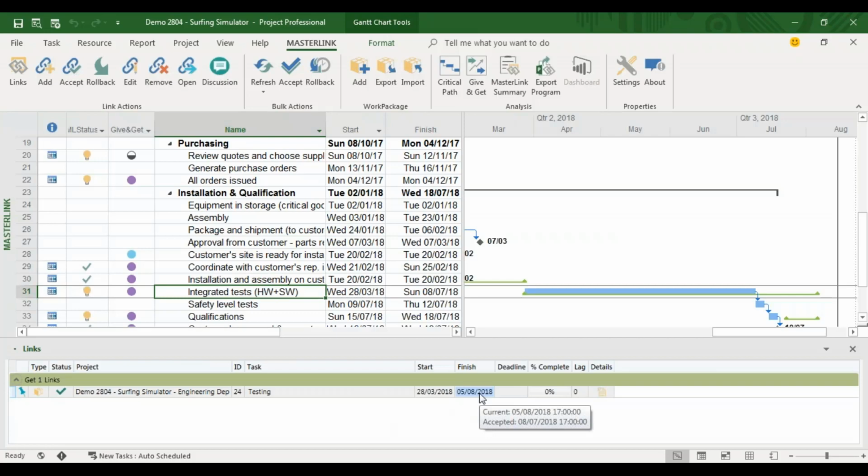We've seen it also in the engineering file itself. And if I go ahead and accept it, what happens now is that my task didn't move, my task duration changed, because this is a work package link, and I'm aligning to what the entire scope in the other project is now planned to. And again, I can say that that presents a problem for me, because of course my entire plan is now pushed, and I can just leave it as an alert and open a discussion on trying to find a mitigation to resolve this gap. And this is the advanced concept of the work package.